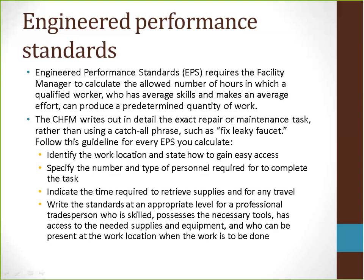First, identify the work location and state how to gain easy access. Next, specify the number and type of personnel required to complete the task. Next, indicate the time required to retrieve supplies and for any travel. Next, write the standards at an appropriate level for a professional tradesperson who is skilled, possesses the necessary tools, has access to the needed supplies and equipment, and who can be present at the work location when the work is to be done.